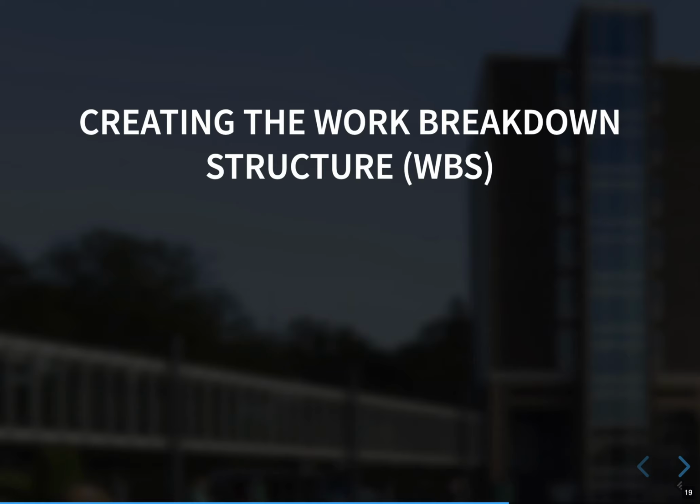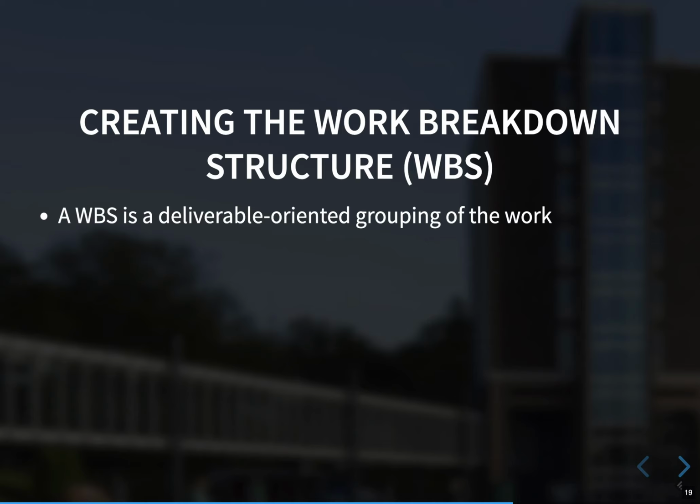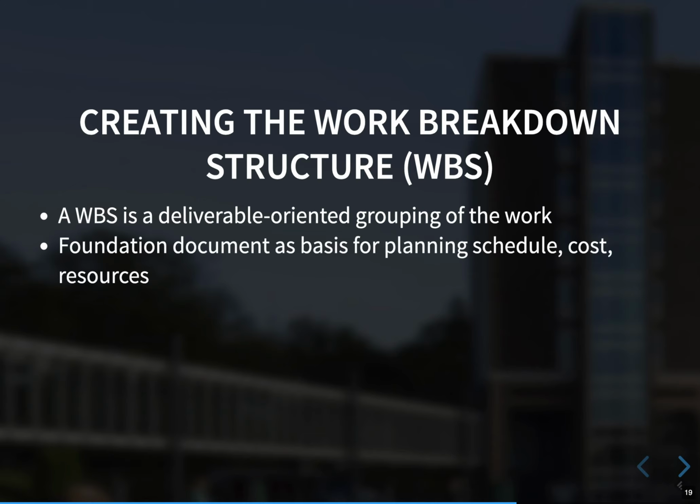And this is the idea of how to create the work breakdown structure. The work breakdown structure is a deliverable-oriented grouping of the work. In your project, the work breakdown structure defines the total scope of the project, so all your work items. Like the name says, you break it down. The work breakdown structure is a foundation document that provides the basis for planning and managing project schedules, costs, resources, and changes.